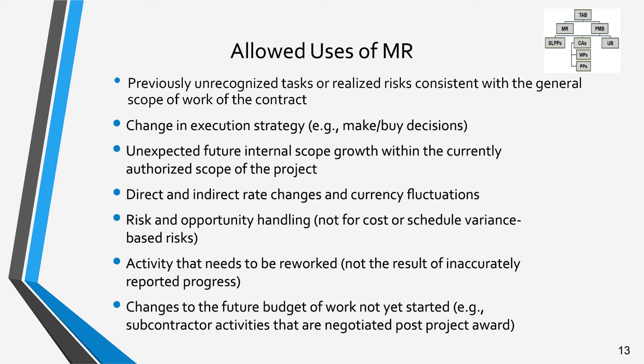MR may be used for changes in execution strategy. An example would be a make or buy decision that is changed from the original baseline plan. This is an example of an assumption change that would be included in the approval documentation. MR may be used for unexpected future internal scope growth within the currently authorized scope of the project. MR may be used for changes in direct or indirect rates, including currency fluctuations.